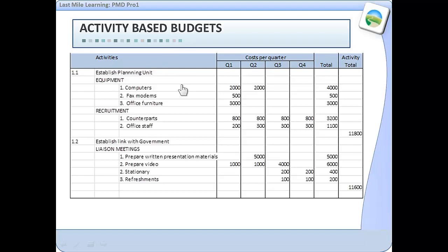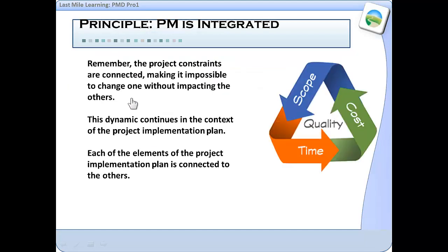Most or a lot of organizations do line item budgeting that are not as useful because it doesn't provide the detail for the expenditures, the planned expenditures, and the actuals in the categories that match up with the way that the work has been broken down. So we'll talk about earned value analysis in the next module as well. That comes from the kind of detail that you find here.